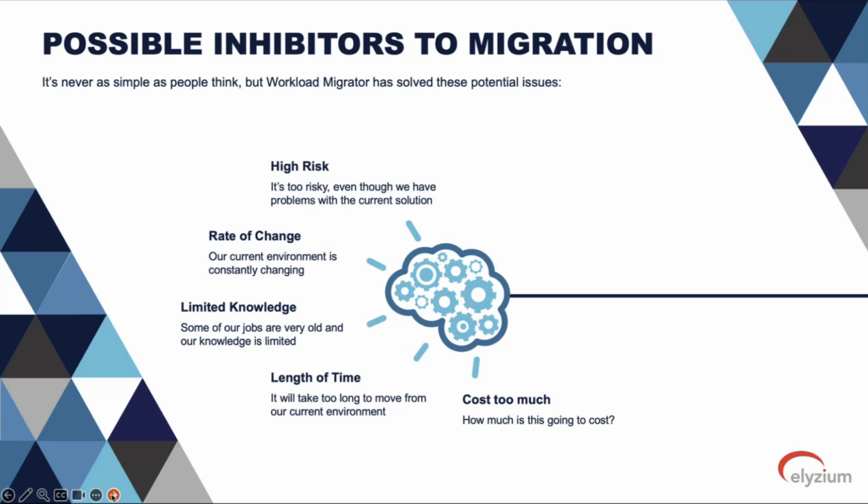And then once you're happy that everything is working, you have a short change freeze within your current environment for that data block while you switch over to the new one. And then once it's live, that block is complete and you can move to the next block. So the rate of change is something that we can overcome with the methodology and with the tool set that underpins it.